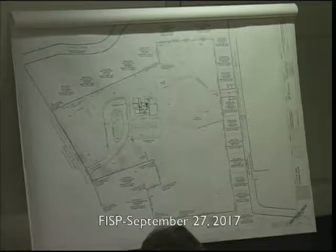By the time we are at this stage, we're reducing it to 6%. By the time we go to bid, and we know John and his firm have done a really good job managing change orders and putting together a set of documents that aren't filled with holes, we may go to 3% or 5% contingency, which would be normal for a new construction project. And then there are some other numbers in there. I put in the actual number of the design fee at $357, $9,813 for survey and $8,700 for our geotechnical borings. So now you're starting to see variances against what our estimate was.